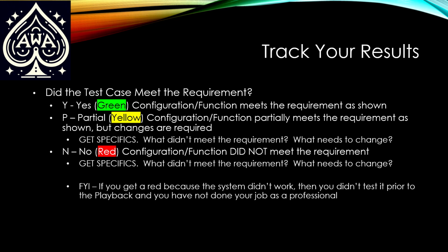Yeah, it kind of worked, but I need to tweak it. A tweak could be as much as, yes, I saw this invoice go to a group of 6 people and that group should have 7 people. It worked, but there needs to be something on there. Yes, make a document that needs to include Sally or whatever.